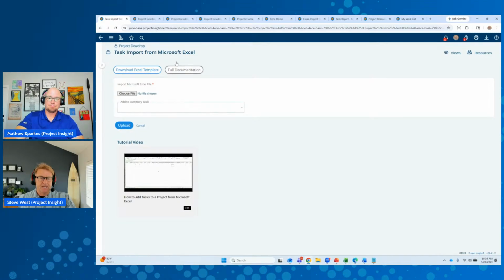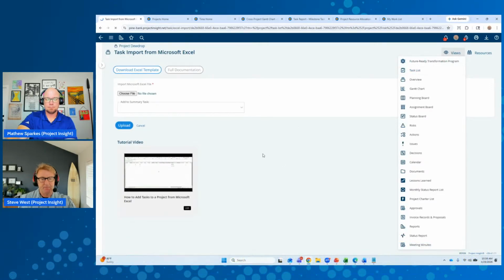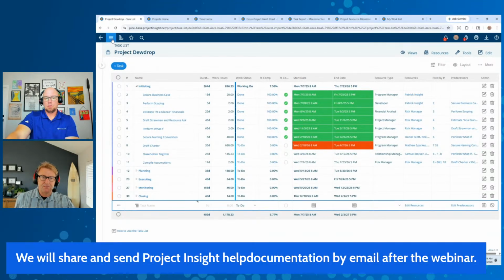Yeah, and then sometimes you have to get your data a little bit formatted, but bringing it all in, it's worth it. And pretty simple. I think if you're using Excel already, the wizardry of moving something in one column to another, little transformations, is usually pretty straightforward, right? You can actually import even the hierarchy or even the predecessor relationships if you choose to set them up. What you'll want to do is download that template and align your columns to the default columns that we have.